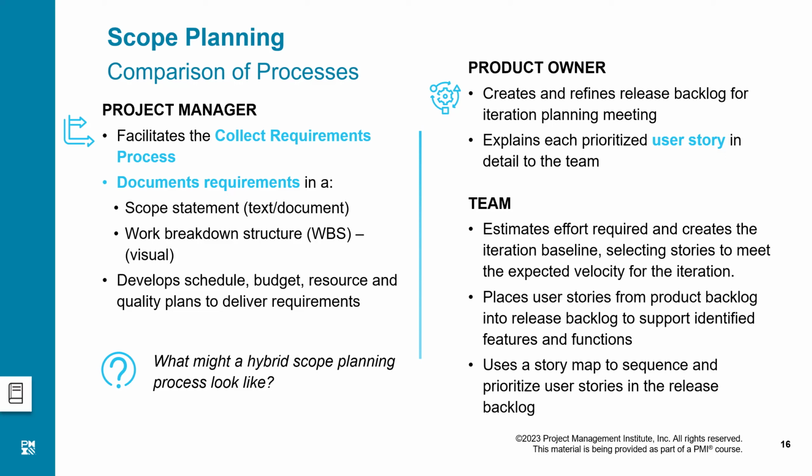But ultimately, when you select certain stories, either from the product backlog or from the release backlog, you bring them into your iteration. So there is an iteration backlog where you put these items which we have selected, and then we start breaking them down, just like in work breakdown structure, planning for them, just like developing a sequence or developing a schedule in a predictive project. But generally speaking, we say that we are not going to use the complicated tools of traditional, predictive project management, because in Agile, we keep things much simpler. Rather than using a schedule and a Gantt chart and a critical path, we do not use that kind of complex environment. We use smaller and easier methods, like the task board.